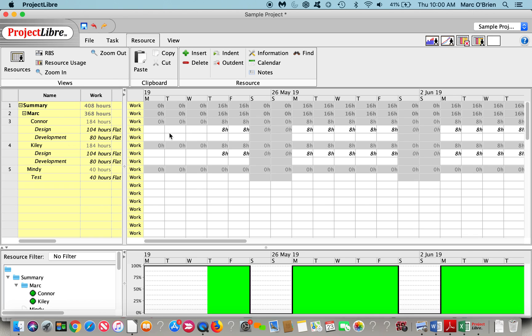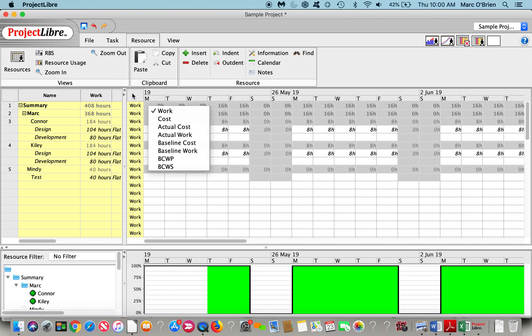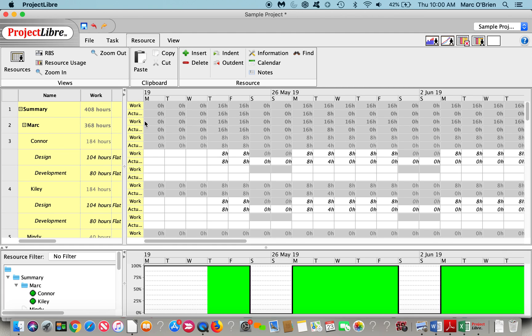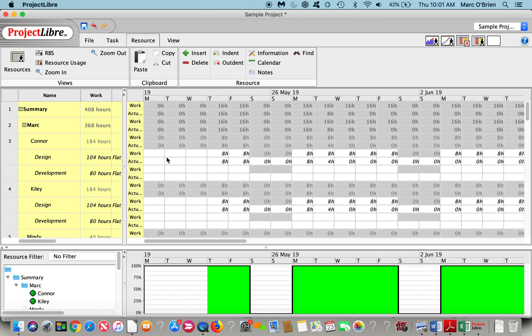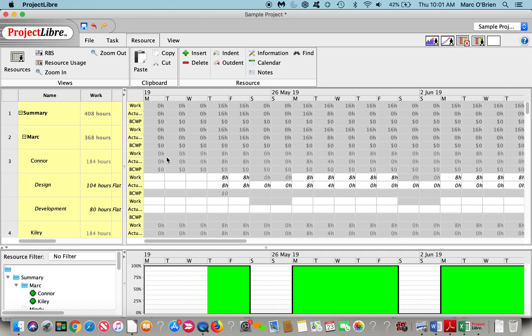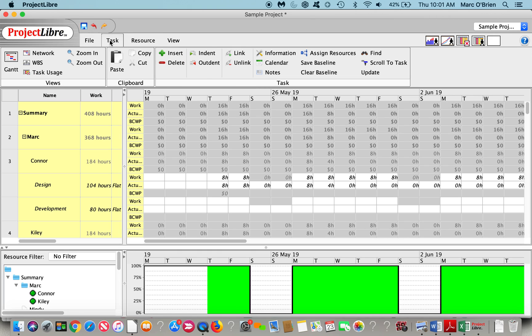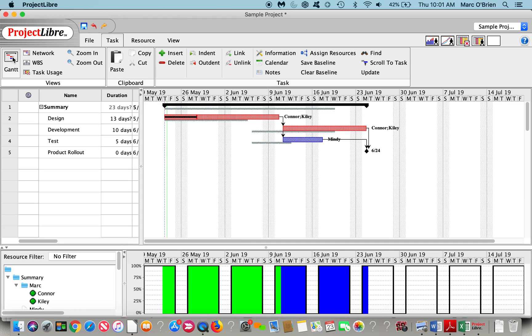The last item I'll go through is resource usage, where you can take a look. It's like a time card. You can see what Connor is assigned to design and development, and you could put hours in there. If you cursor in here and right click on the corner, I can put actual work in here as a column or as a row. If I want to put budgeted cost of work performed, for instance, and all of these items. It gets very detailed and it's high level project management software, but this gives you an overview.